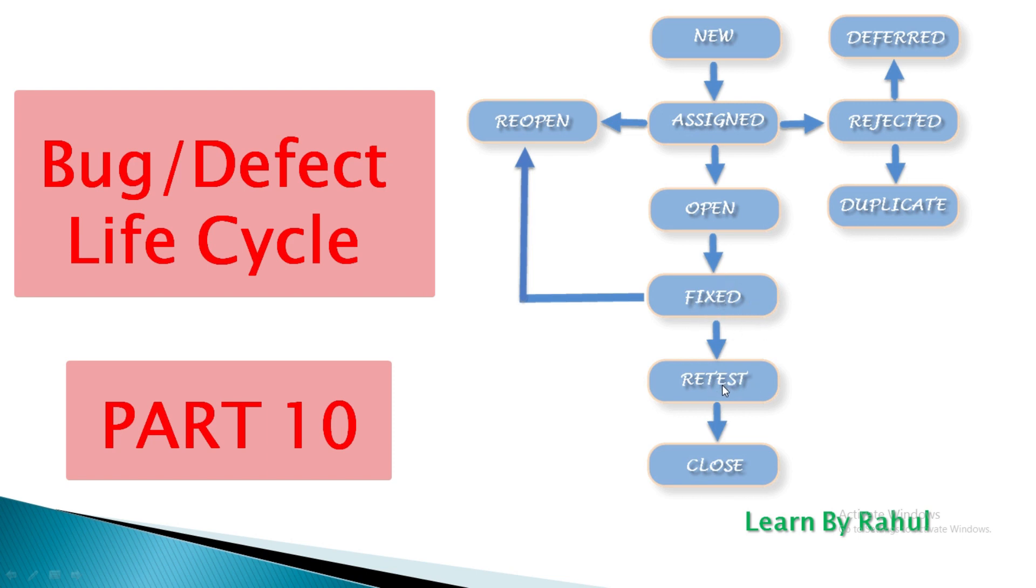After being assigned, there may be three types of conditions. First is DEFERRED. If the present bug is not of prime priority and is expected to get fixed in the next release, then status DEFERRED is assigned.